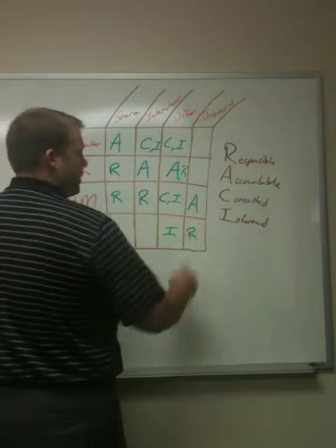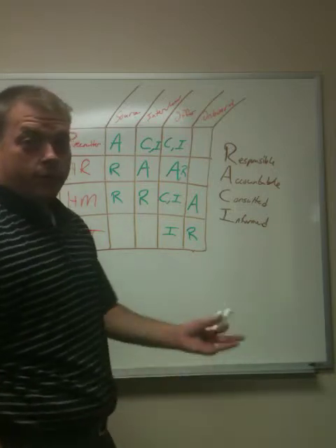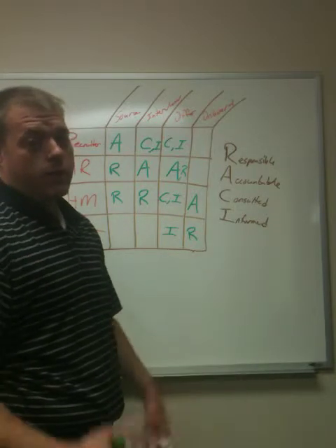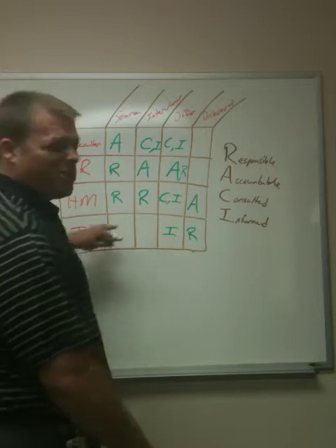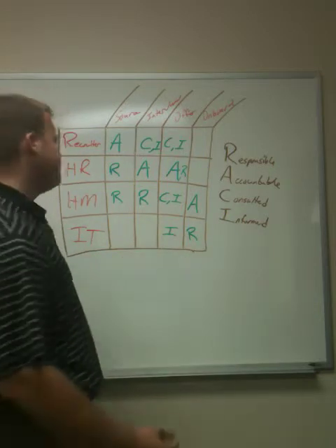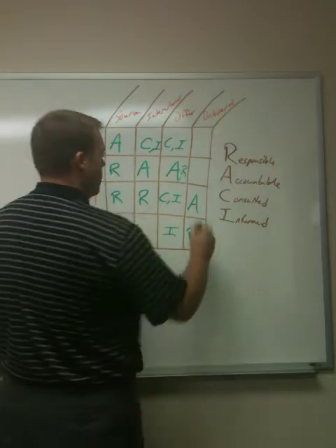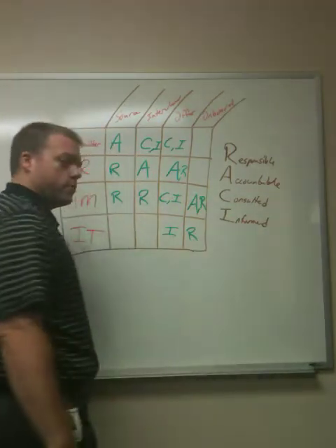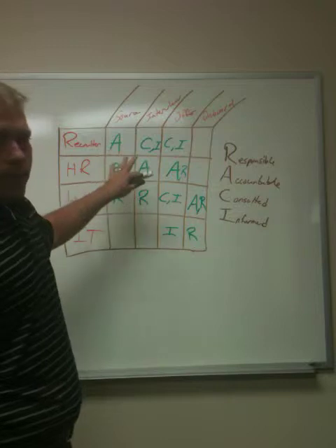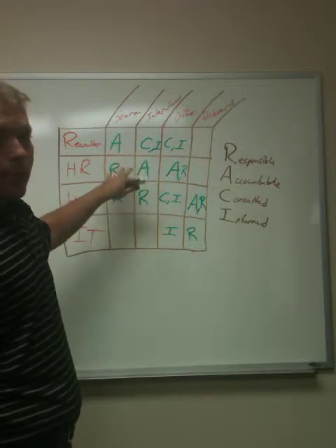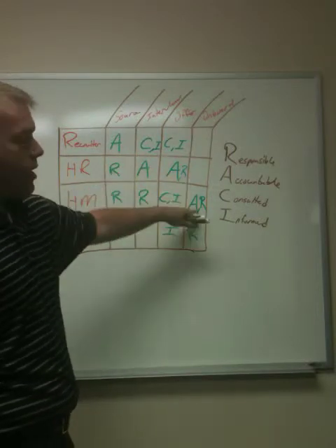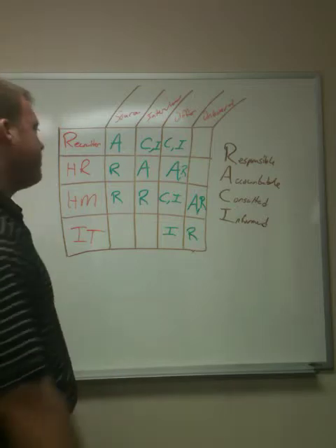IT is responsible to make sure the onboarding is done. Make sure all the logistics are taken care of, the equipment is ready, they got a place to go. That could also be your facilities team. They have a role to play in that too. Hiring manager, we have said they are accountable. They have to do this work. And they're responsible too. They have some work to do. It's pretty rare that you'll see someone who is accountable and not responsible. So a lot of times people will leave off that second R. I'm just putting it here as an example.